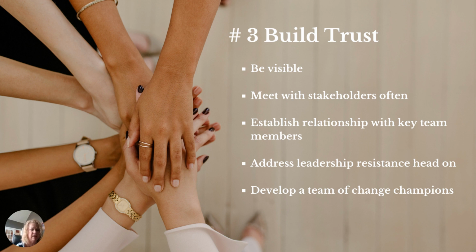If visibility is an issue, face to face, I mean, virtual is good. A lot of people these days are working from home. I myself have worked from home for over 10 years. I love it. But there are things that being virtual just does not fit the bill for. So you do have to do that face to face thing. Meet with your stakeholders often. I would say at least once a week to inform them on what's happening, see if they have any concerns, and share the next steps, what's going on the following week. All of that good stuff has to be shared with your stakeholders regularly.